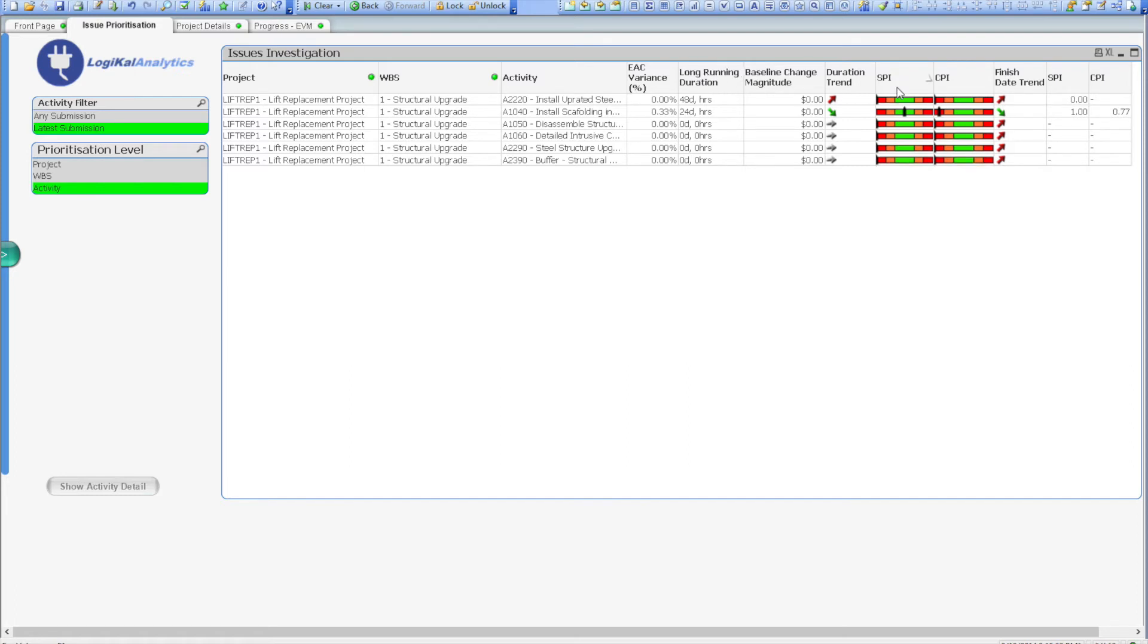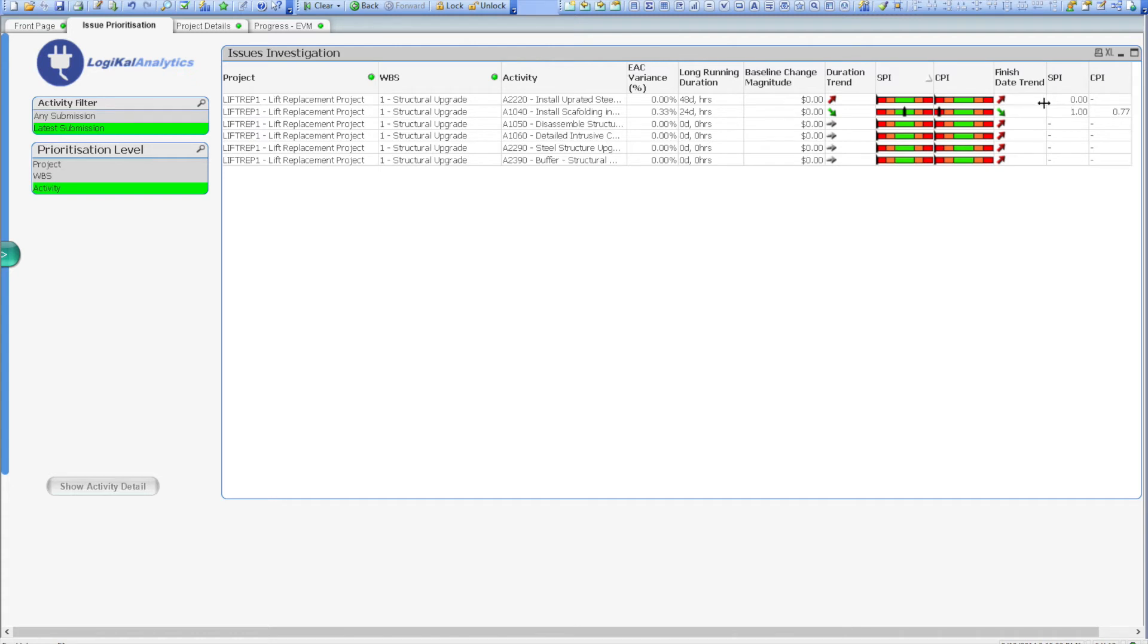This time we can see that there are in fact two activities that have SPI performance recorded against them. We can see the first activity in the list has been slipping in the duration trends column, and currently has an SPI of 0, so it hasn't started. The second activity has a recorded SPI of 1, suggesting that it has in fact finished, and we can also see that the completion date was brought back from the last submission.